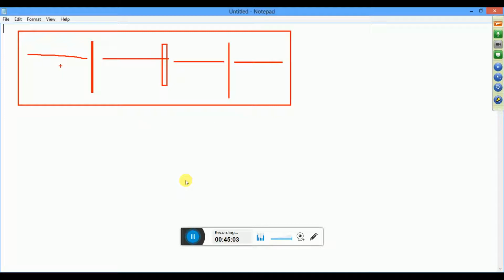Now all these changes have to be tracked because every project has its own manager and everything, but somebody has to track if all these things are working together or not. Let's say today evening at 4 o'clock you have a deployment. By 4 o'clock to deploy the application, you need the code. It means the developer should have finished the code by 4 o'clock. Then you deploy it. You say I will deploy it from 4 to 5.